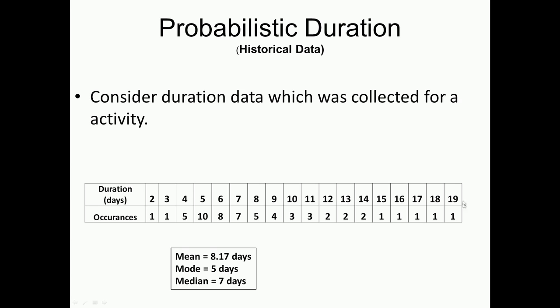So if we take historical data, what I have given here is a table. How would I collect historical data? What we would take is an activity, and you can see the number of occurrences of a particular duration that activity has undergone. The activity has been done in as short as 2 days and as long as 19 days. And this is really the frequency of occurrence of the various days. You can see that on 1 instance it was done in 2 days, in 1 instance 3 days, on 5 instances 4 days, 10 instances 5 days, in 8 instances it took 6 days and so on. So this is basically my historical data. Now I can do my statistics, my basic central tendency statistic on this, and I get the mean of this is 8.17 days, the mode is 5 days, and the median is 7 days.